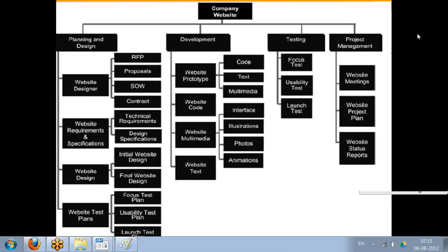Yeah, so that's fine. So starting from this WBS, we'll be getting around 45 questions. So this is very important. Without doing a WBS, your estimation accuracy levels will not be good. Unless and until you do a WBS, you will not get a very accurate estimate. So before committing anything to anybody, you must do a WBS. Then estimate at the work package level, the lowest level, which will be more accurate. Because unless you do that, you will not get an accurate estimate.